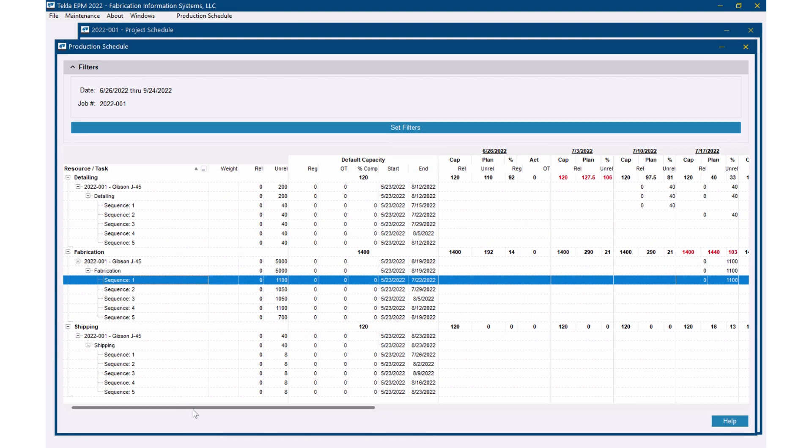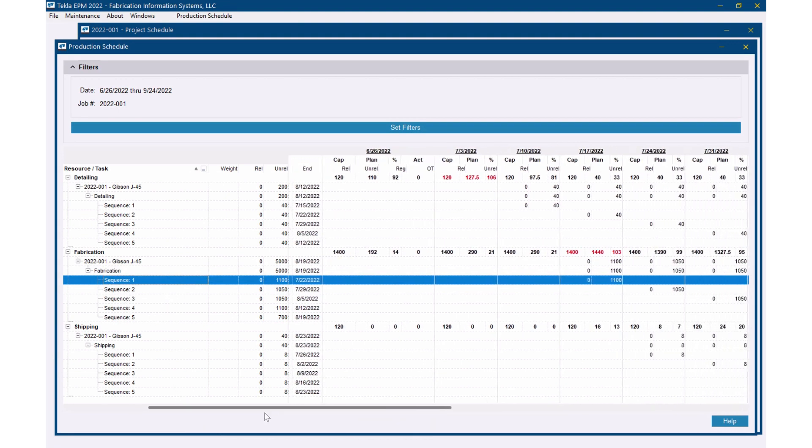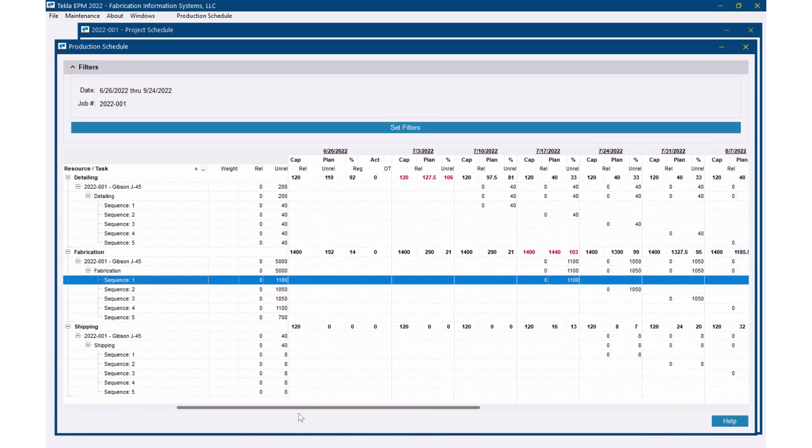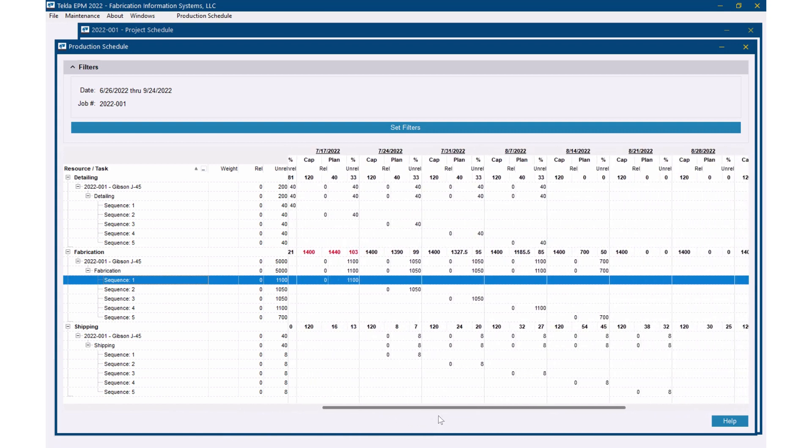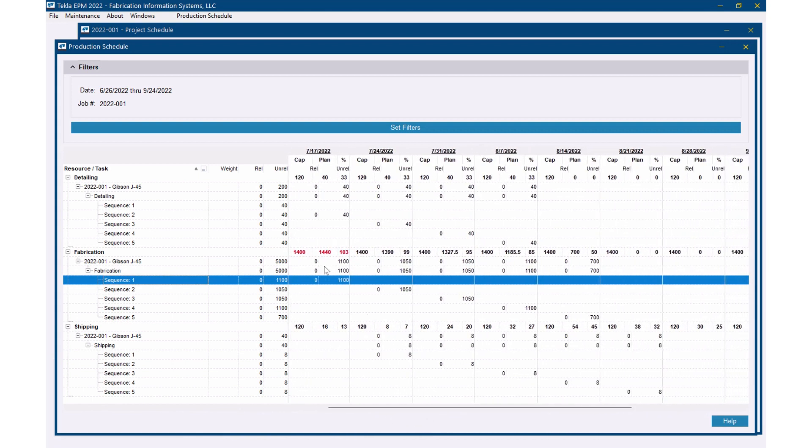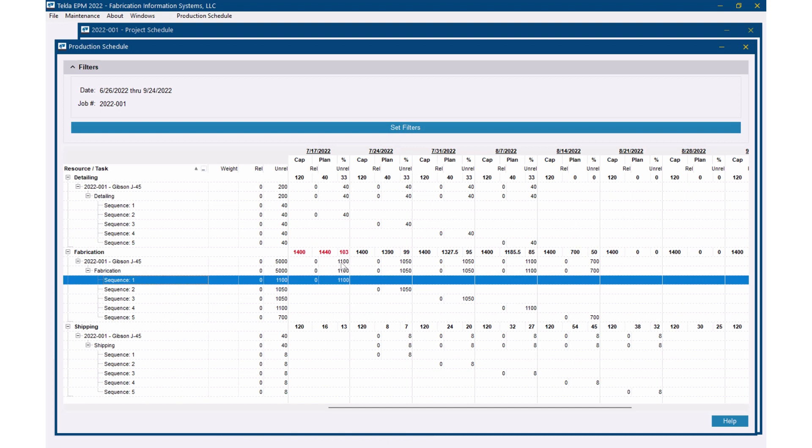If I move out you see week by week. So for instance if I come out here you can see the fabrication for the week of July 17th. I've got 1400 hours of capacity in my shop but I've got 1440 hours planned which puts me at 103% capacity. 1100 of those 1440 hours was coming from this one job, this 001 job.